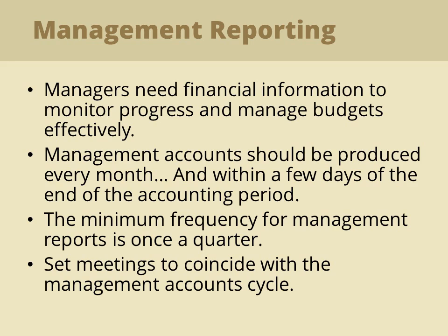Managers need financial information throughout the financial year to monitor project progress and manage budgets effectively. If reports are produced on a timely basis, any problems can be addressed early on and action taken to put things right. Ideally, the management accounts should be produced every month and within a few days of the end of the accounting period. Any later, and the information becomes out of date and less useful.